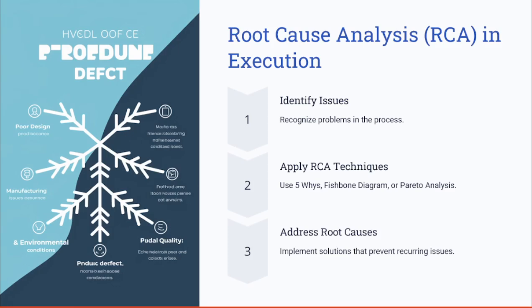For example, if you are facing an issue with a lot of defects escaping the testing phase, you start by asking why there are many defects escaping the testing phase. Then you start collecting data from your team, and you keep asking them why, five times. So you become clearer about the root cause of that problem.